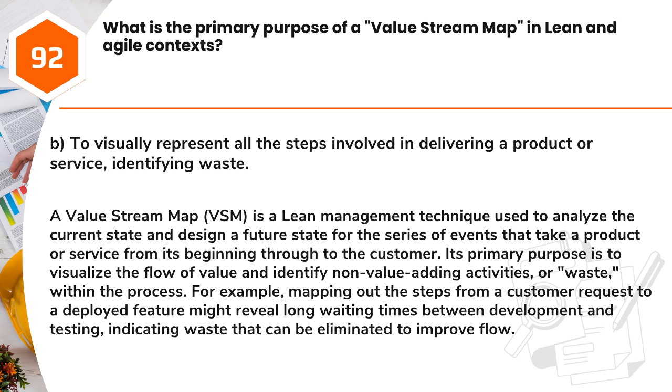For example, mapping out the steps from a customer request to a deployed feature might reveal long waiting times between development and testing, indicating waste that can be eliminated to improve flow.